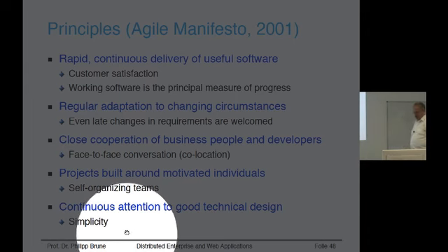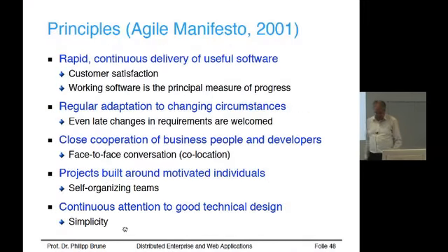Because the problem always is, if you have a big project where everything's planned, if you have fully specified UML diagrams for everything, it's basically just coding down these things. But if you have changing requirements and very challenging customers, it's always good to have software design that's as simple as possible. You can make easy changes. And this requires that you spend much more effort on quality of code throughout the whole project. Not only test at the end, but testing functionality, but also non-functional requirements and also architectural aspects from the beginning.